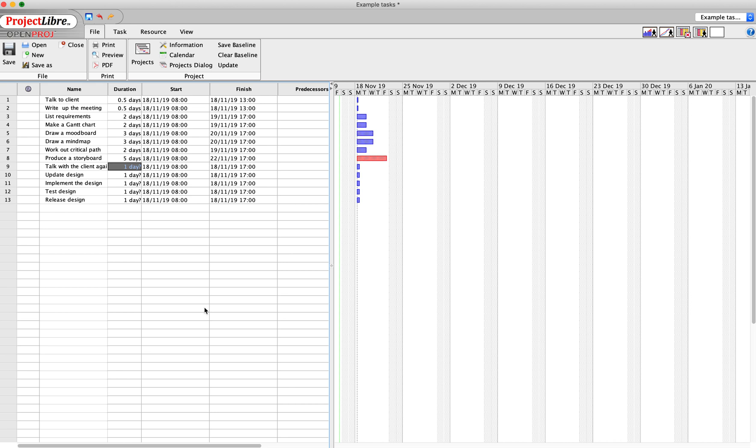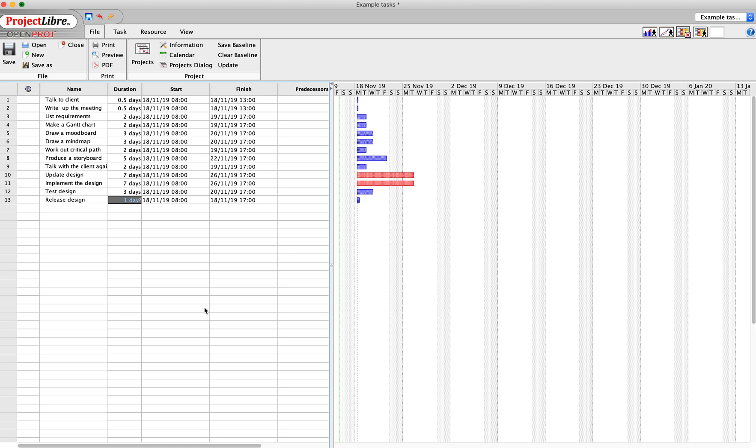That's lots of work. Talking to the client again, that's going to be a couple of days. Updating the design takes a week. Implementing the design is going to take a week. Test the design is going to take me three days, and release the design is going to take me one day.